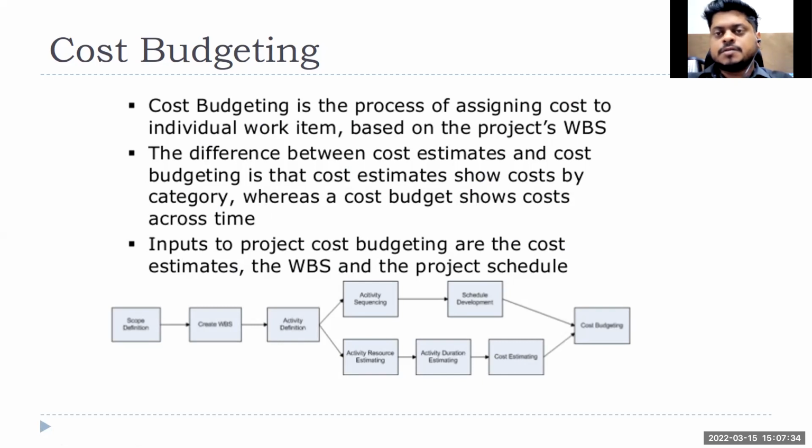Then the finance team, obviously, it is not that they're searching for banks for companies like L&T. They have tie-ups with different banks, different finance corporations, right? Depending on where they get the most benefit and what kind of contract is there, accordingly they'll take a loan. So once you put in your cost estimation, you are then specifying, for each month, each duration, each time frame, what is the requirement of cash, what is the requirement of budget?